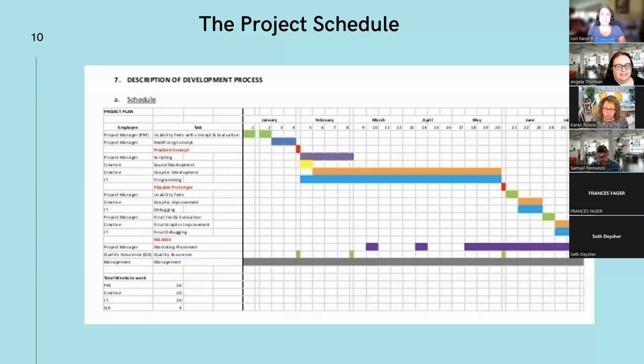Now, let's hope that if additional scope is being added to the project, additional resources are being added as well. So there would be more budget, possibly additional team members or at least additional hours to cover that scope creep. And that would be one reason why your schedule might need to be updated and re-baselined.